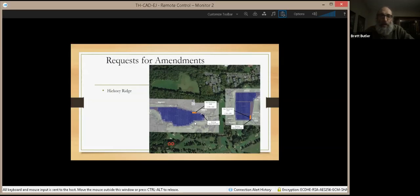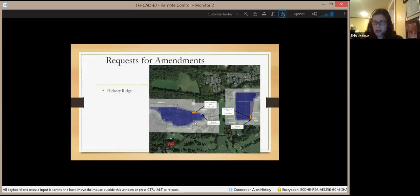Okay, let's go on to some contamination, Aaron. This is more of a verbal update. On the remediation side, they did some drilling earlier this week to look at the soil contamination. What they found was that the area of contamination is much smaller than originally thought. So they're looking at different options: in situ treatment, which would basically be injecting ozone into the area of contamination to break it down faster, versus excavation of the contaminated soils. Right now they're doing the exploratory part to determine the best process to clean the site. That's where things stand. That was my last update, which was today. So it's a quick one.